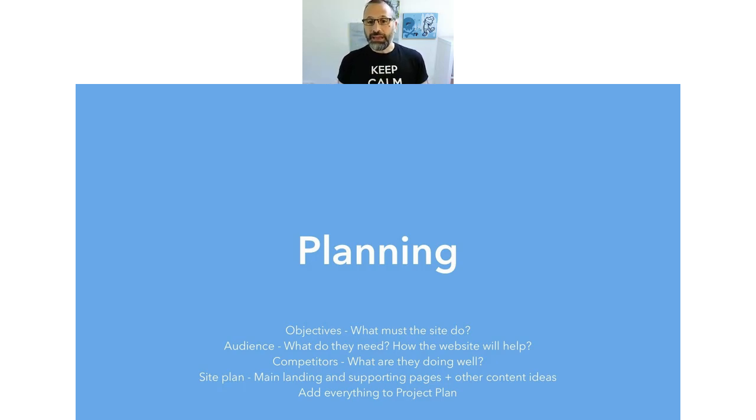And then putting everything into a project plan. And the project plan will tell you who's working on the project. It's going to go through the objectives, any timelines. It's going to have the audience details, competitors, and so on. So often, the first call we have with the client, we go through all of this, collect a lot of information, then put that into one plan. And that can be shared out with the client and anyone else working on the project. So we've all got one base point to work from.